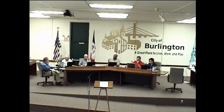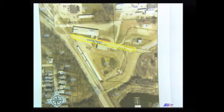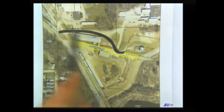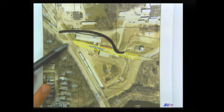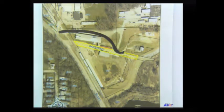Get this map up, which has to have access to their property back here along the levee. So the Burlington Truck and Rail has discussed maintaining an easement area to provide access with the existing entrance off of Bluff Road there in lieu of the Oak Street crossing. This also affects our trail design along Bluff Road. Currently, it's dead-ending approximately in the area of this driveway access from Oak Street, so that would affect how that design and construction occurs if this is vacated or not. I don't know if Nick has any additional information.